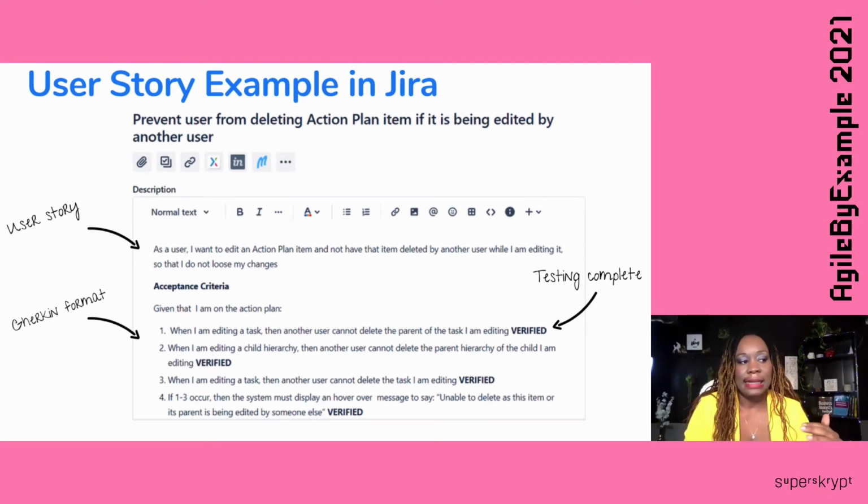And in this case, when I write all of these user stories, we had a kind of a system. Everybody does it differently. Again, you own your methodology, right? You don't rent it. So when we decide to do Agile, we tweak it to match our environment. So what we had them doing was, once you have tested the user story, then you would mark it as done.